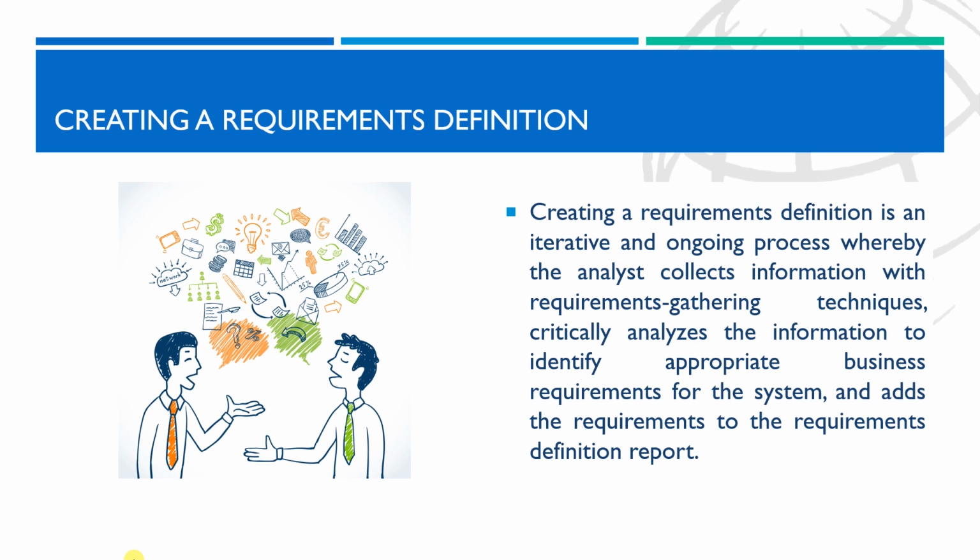When a requirement reflects a real business need, but it's not within the scope of the current system or current release, it's either added to a list of future requirements or given a low priority. The management of requirements is one of the hardest parts of managing a project, and another part of the functions of a project manager.